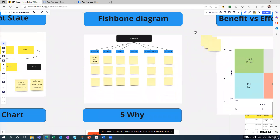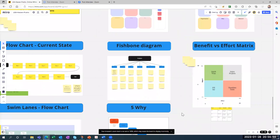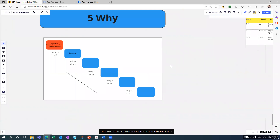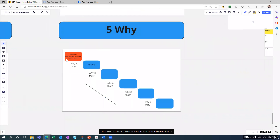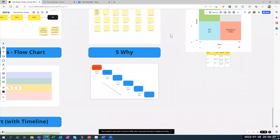After that, complete a fishbone diagram — type in your problem statement and then fill in the categories: measure, material, man, method, mother nature, and machine. You type causes into these boxes. Then you do the five why (5Y) analysis: put your problem statement in, put your answer, ask why, put your answer, ask why again, and fill it out until you reach the root cause.